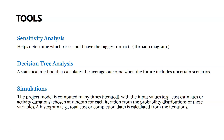The most common simulation is the Monte Carlo simulation, where the project model is computed many times with input values like cost estimates or activity durations chosen at random. You're simulating what your project would be and running it many times with certain risks and cost or duration estimates to see what is most likely to happen. The output is a histogram showing total cost or the completion date for your project.